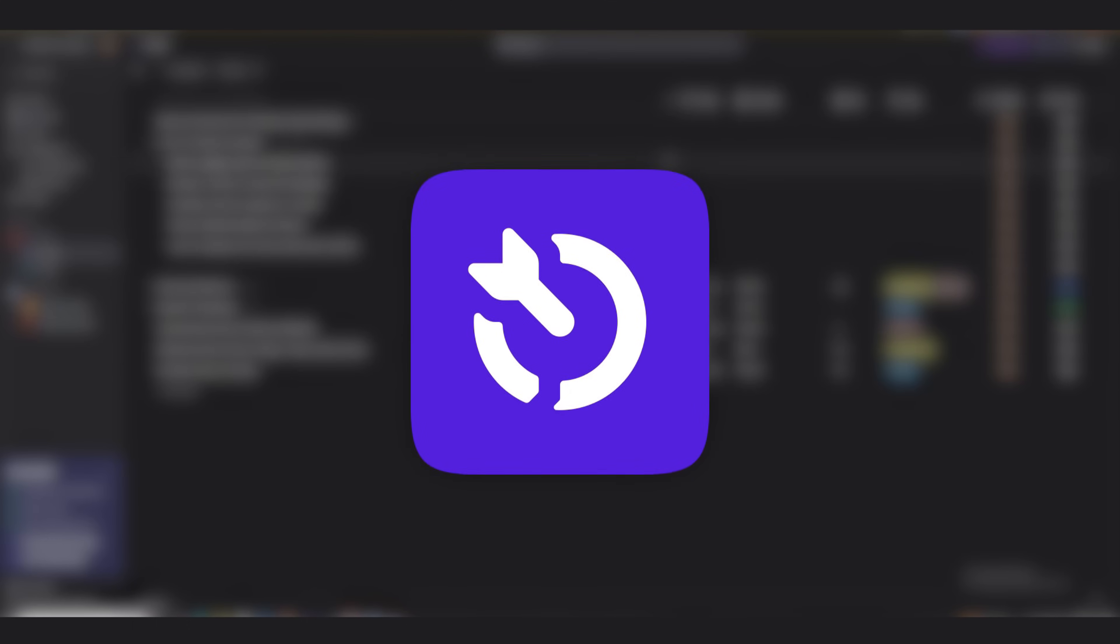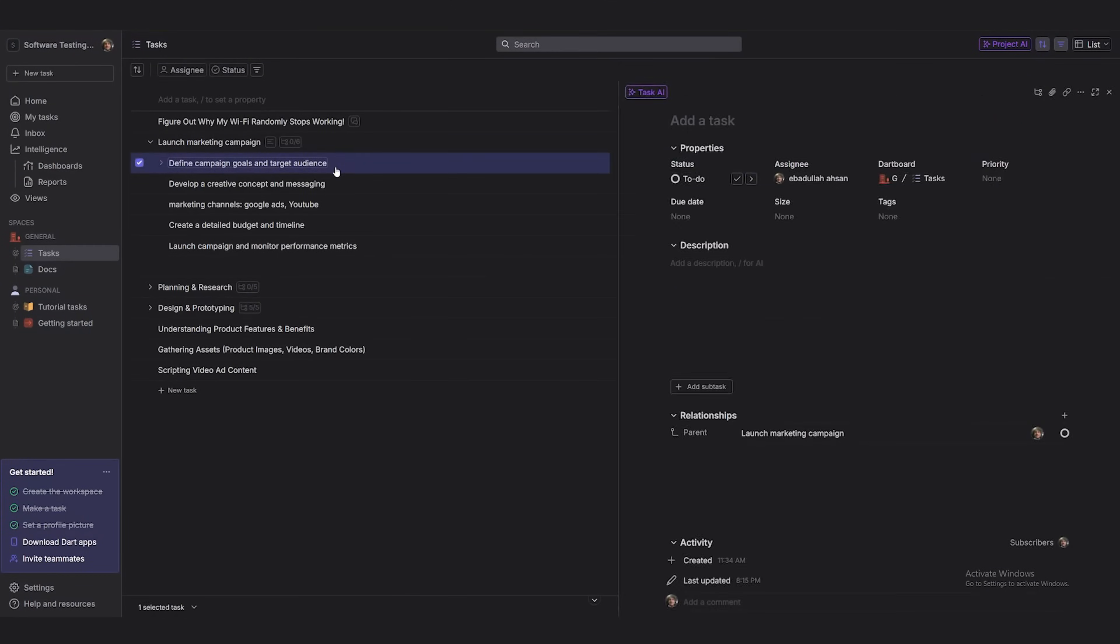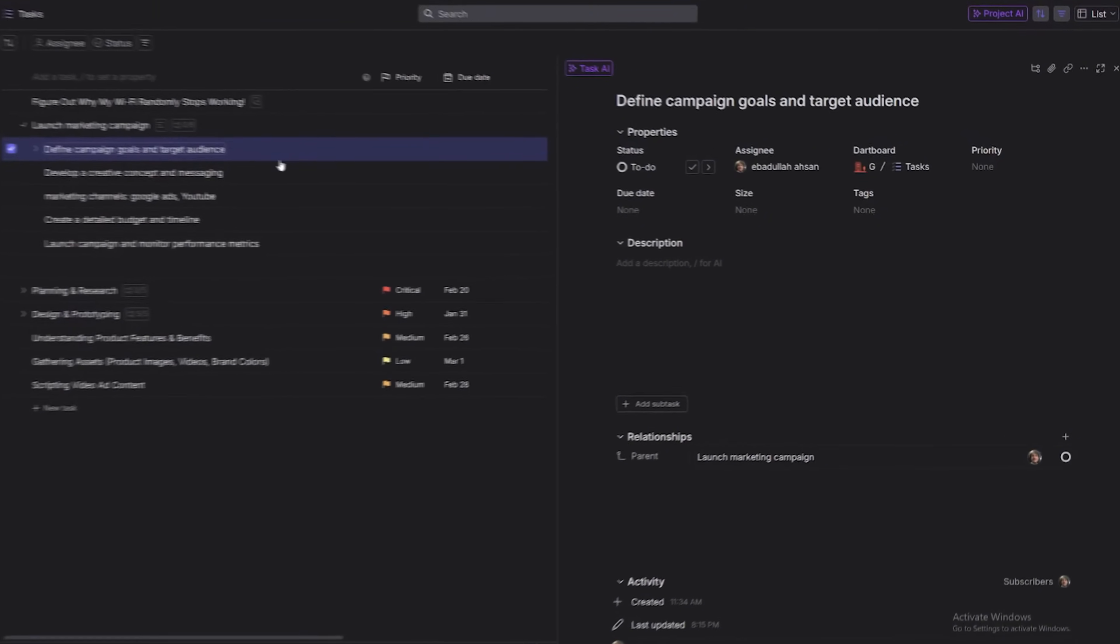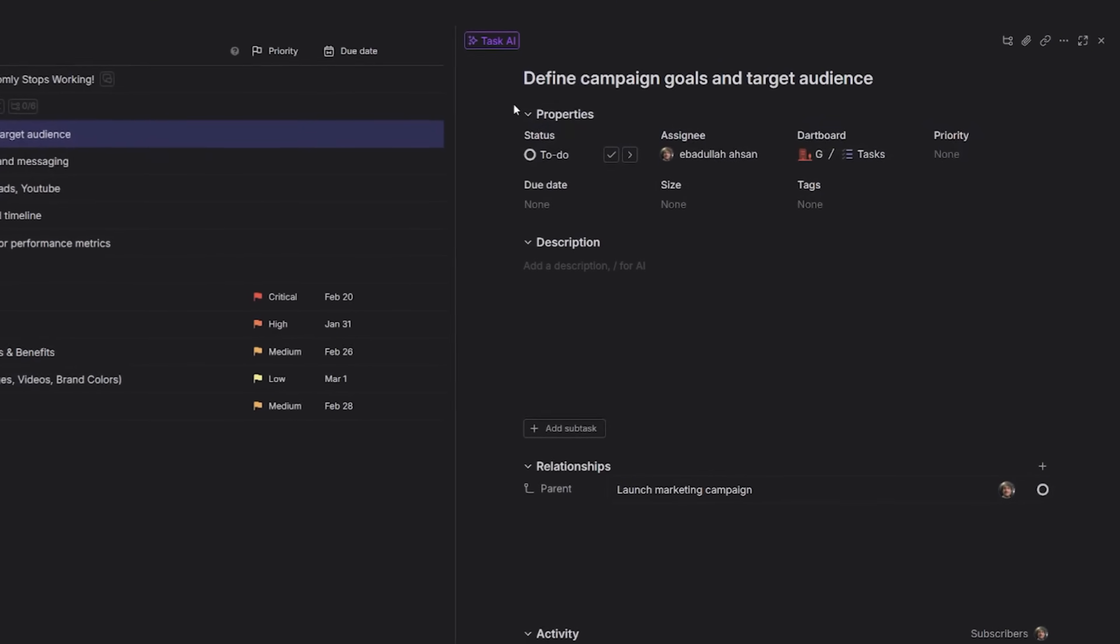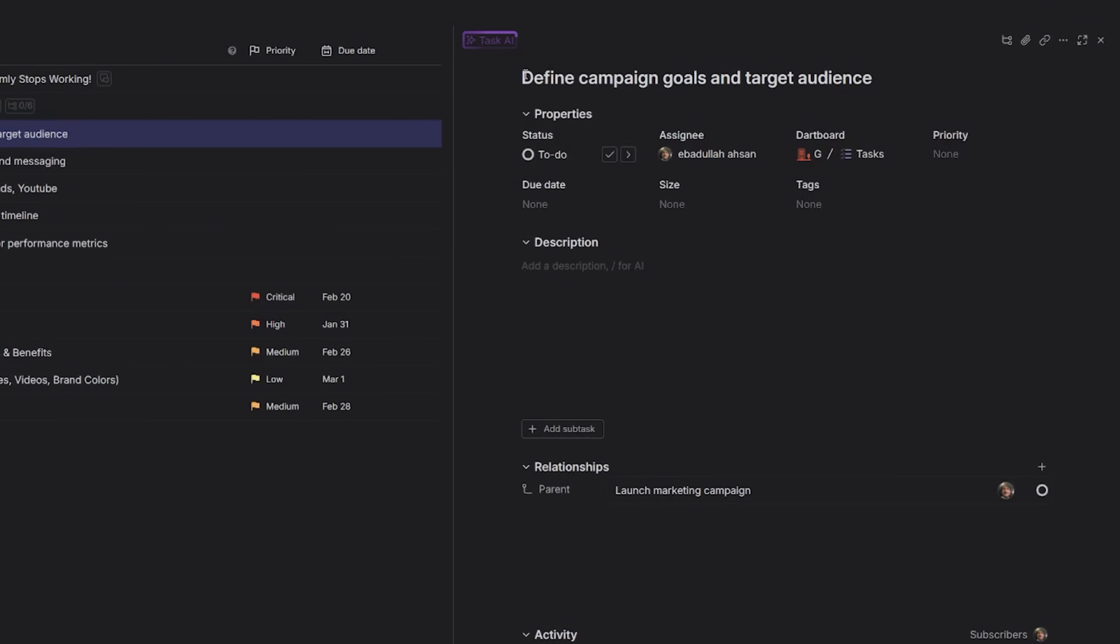Dart does the thinking for you. Click on any subtasks to open its details. Find the Properties section right below the task title. Spot the AI assistant? Good. Click Auto-Suggest and watch Dart fill in due dates, priority levels, and assigned team members, like it's reading your mind.